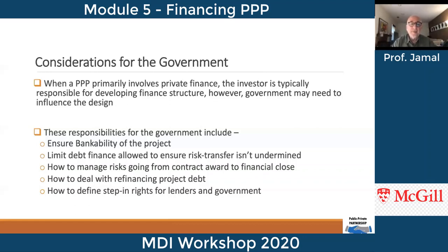This process between the award and financial close could take between 6 and 12 months sometimes. It's very important that you ensure the SPV or the contractor follows due process and provides you the information needed. You might also need to follow up from your side and do your own due diligence.